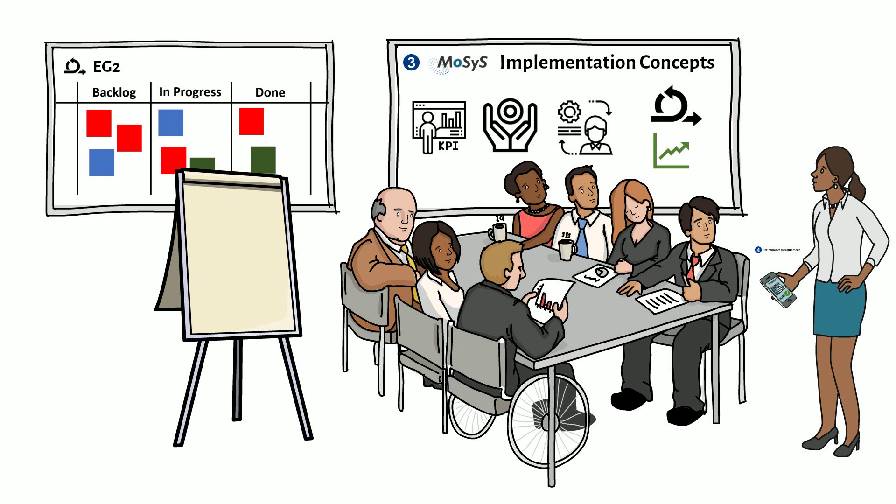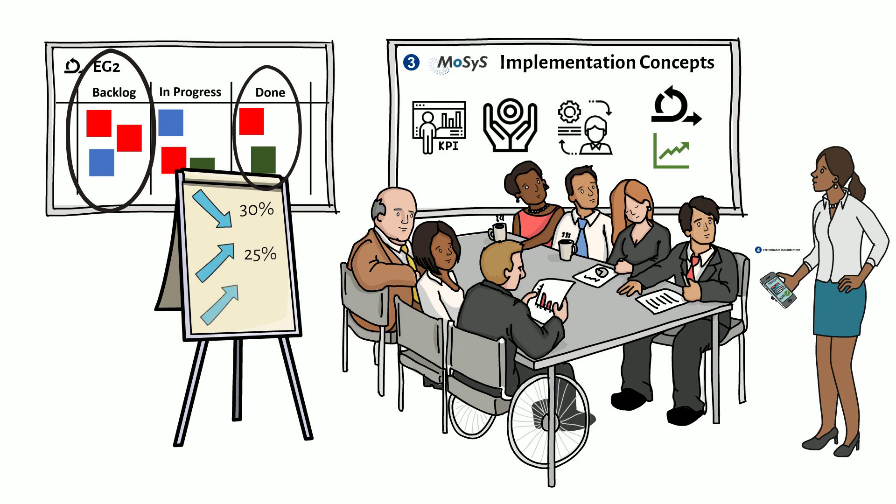After the first four sprints, a clear trend can already be recognized in the retro. The number of non-estimated backlog items was reduced by 30%. The number of backlog items implemented in the sprint was increased by 25%. The mood in the team, measured with its own defined KPIs, was improved by 70%.